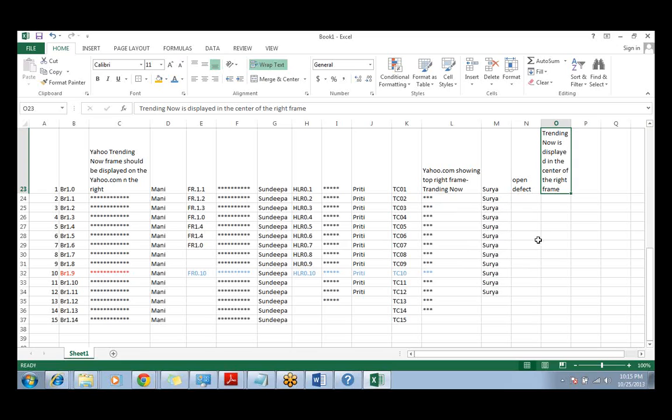This traceability matrix is to assure whatever the requirement is given over here is getting tested over here. The defect processing, the allocation of the defect, making sure the root cause of the defect is outside of the requirement traceability matrix, that has nothing to do with RTM. The RTM is just to assure that all the requirements are getting implemented.